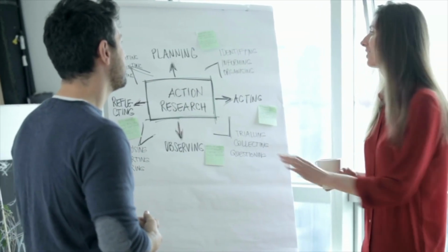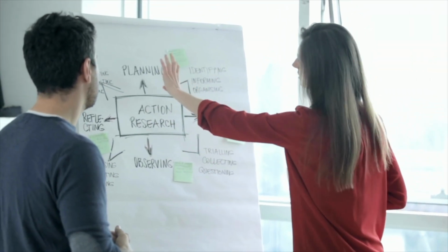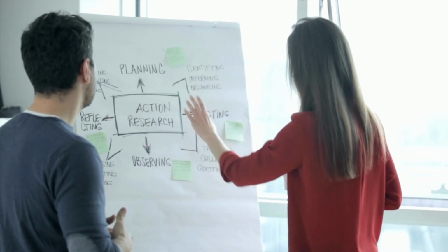And then the most likely time should be your best guess. It is the time you actually think it will take, maybe with a little contingency added. This expected time frame is essentially the time it takes to actually do the work, assuming all the risks have been mitigated, all the plans are accurate, and you understand the staff skills and what work needs to be done. This would therefore go into your project plan and schedule.